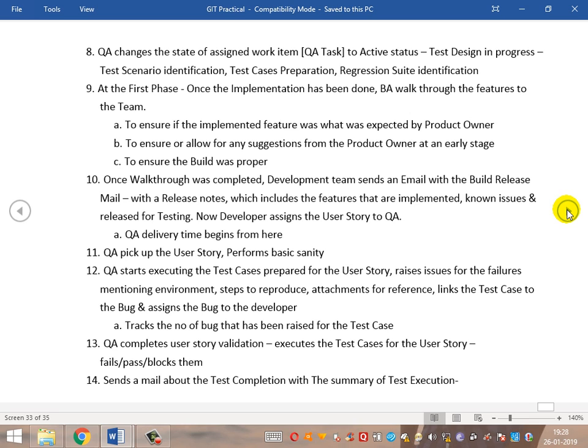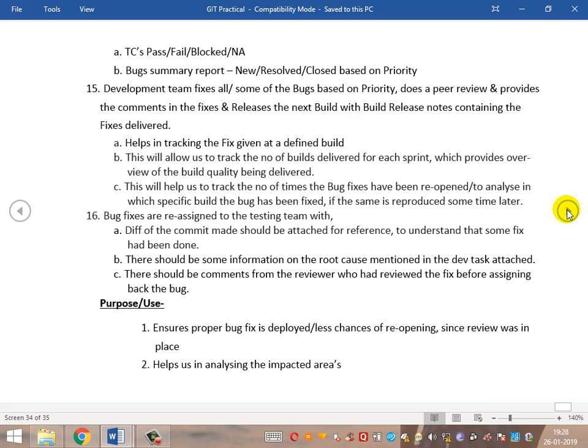QA completes validation by executing all the test cases. Some may fail, some pass, some may be blocked, and some are not applicable. QA then sends the test completion report — the test summary report, execution summary report, and bug summary report — which includes pass, fail, block, and not applicable counts, along with a bug summary report based on priority showing new versus closed bugs.